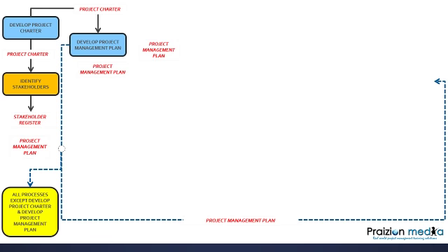So throughout this main line, I'll be showing you lots of other relationships, but I'm not going to show you every single relationship because I've covered it in a one size fits 47. The project management plan goes everywhere in the PMBOK guide except develop project charter and the develop project management plan process itself. All right, boom, I just saved you a ton of time if you didn't know that.